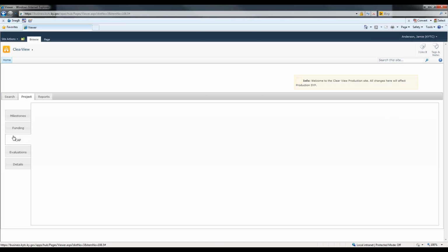Next tab is the cap. This is where you can input a cap note and print a cap report. The cap, communicating all promises, note tab is used to view and add any promises made that are associated with the project. Just a note, once a cap note is entered, it cannot be deleted but can be overwritten by adding a new cap note.